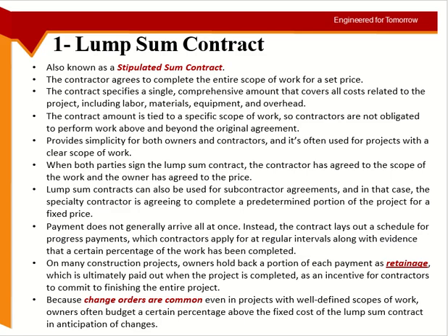There is some payment which is also called retainage money. I forgot the other term they use in Pakistan, but retainage means it's like a warranty. When the whole project is complete, I will go and check everything, and I will not give you this final amount until I am completely satisfied.